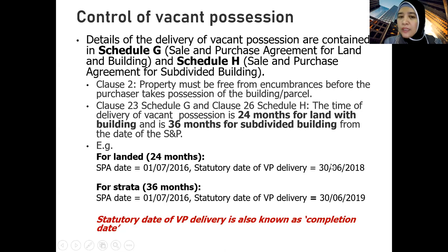2018. But notice the date. See the date. If you sign on 1st of July, the last date when the property must be delivered is on the day before, 30th. The delivery must be done on or before 30th of June 2018. It's not 1st of July, bukan. It's the day before. Itulah habis dia tu.